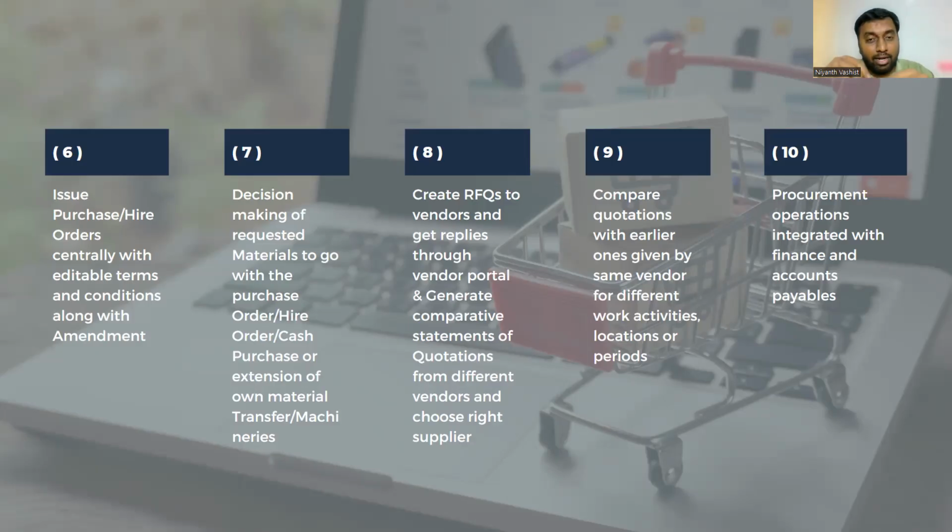There is no plant right next to Bangalore. So the problem was the lead time was 6 days. So that deal only the site team can sign, not the Mumbai or the head office team. So it is very important for a few terms and conditions to be signed by the central team, and a few terms and conditions to be signed by the site team.